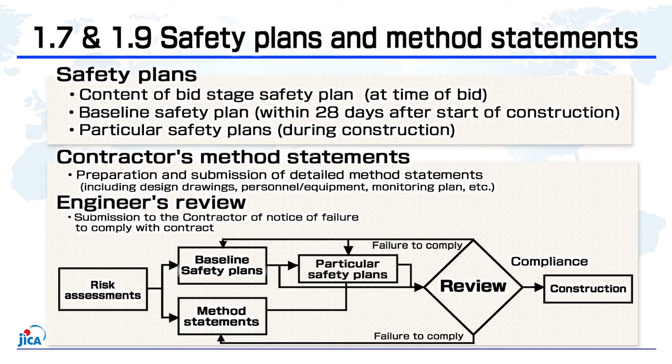Section 1.7 covers the preparation and submission of the contractor's bid stage safety plan, baseline safety plan for commencing the work, and particular safety plans for the construction stage.